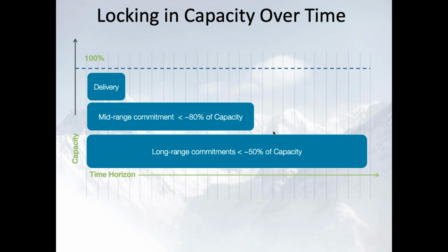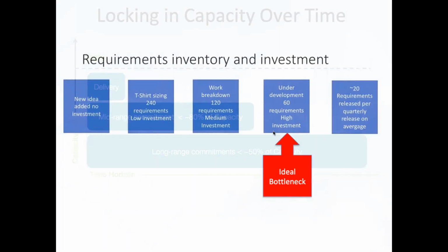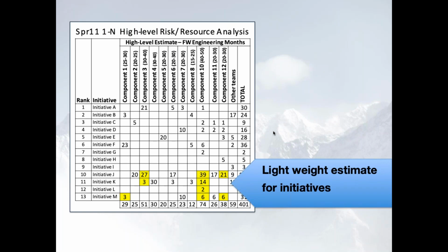Very cool. There's a question, how do you decide the priority from the sheet that you showed? I'm assuming he's talking about that one. Yeah, yes. This at HP was by the marketing team. This is what they said added the most value, and we had the low-end printer and the high-end printer and the mid-range printer and the scanner, and all those different marketing leads got together and they had one person provide us a prioritized backlog.